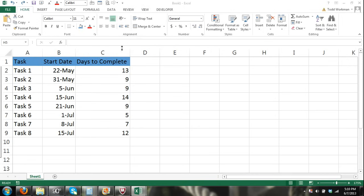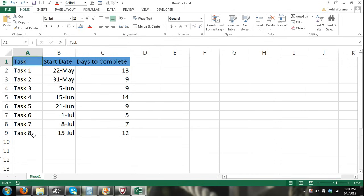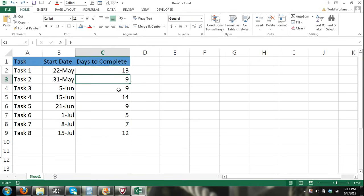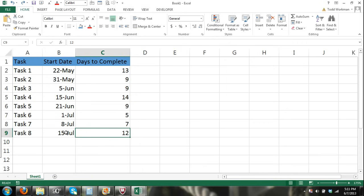First we have to enter our data into Excel before we can create our chart. I have three columns: a task column with tasks one through eight, a start date column showing the day each task is to start, and a days-to-complete column showing how long each task is to last. For example, task eight starts on July 15th and lasts 12 days, so it should end on July 27th.